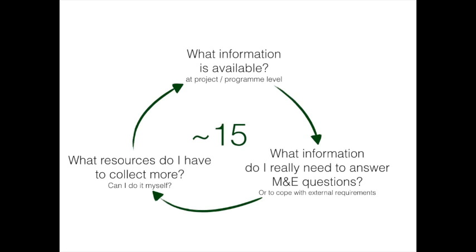It's exactly the same when you are buying a car or a house and when you are monitoring and implementing a program. You cannot use too much information. We find that 15 indicators is often the sweet spot in the M&E system between what we can actually process as information and what all participants ask to be monitored in the system. Of course, your mileage may vary.